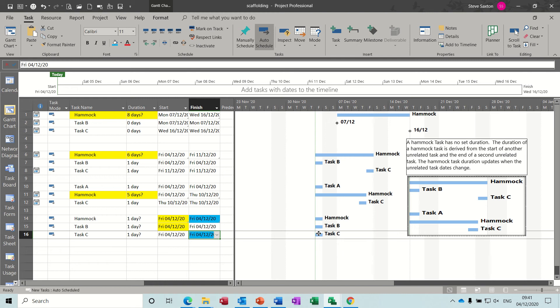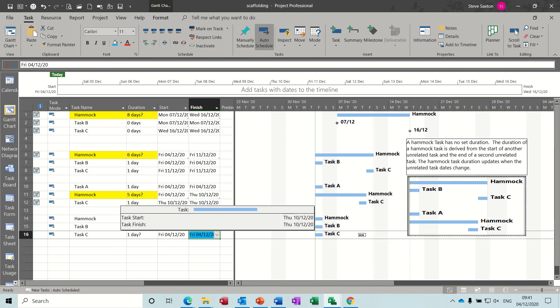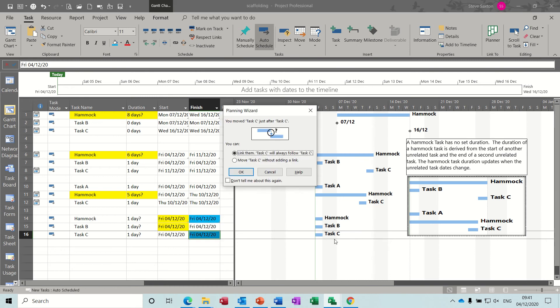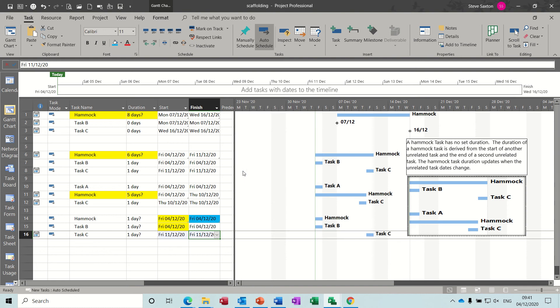So let's change something. If I say this, well let's say the end of the project - or this task - this task moves forward to next Friday. I don't want to have a link, so clicking okay to that and then okay to that. So now the hammock task should move across and show that distance.